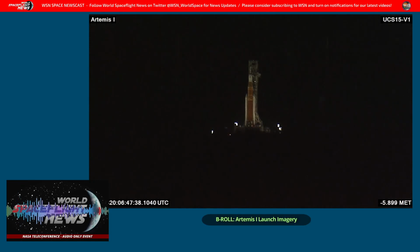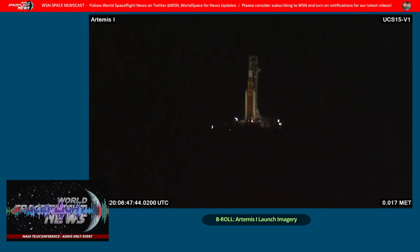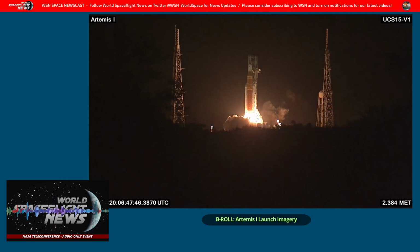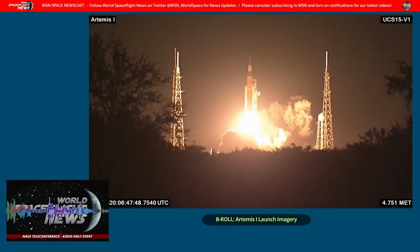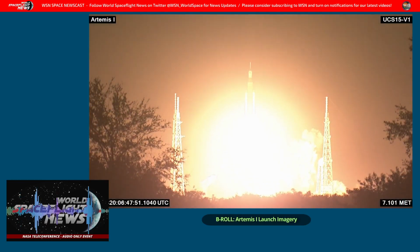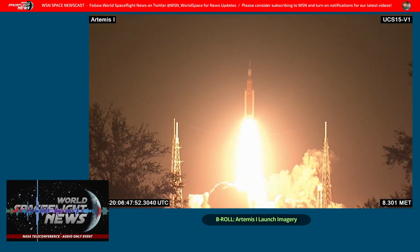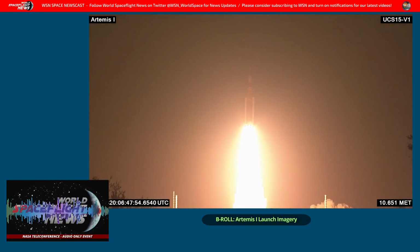That continued our flow of Artemis II crew module completion. And we're also doing a lot of work now on the testing of both the service module and the crew module. Currently, we're finishing up the integrated service module acoustic test. It'll be finished tomorrow, and then we'll be doing final touches with the service module in prep for stacking with the crew module. The crew module is finishing up both subsystem tests and communication and GNC, and they've got a couple other functional tests remaining, and then we will go through a crew module thermal cycle test. It's one of the remaining tests on the crew module before we do the stacking as well.